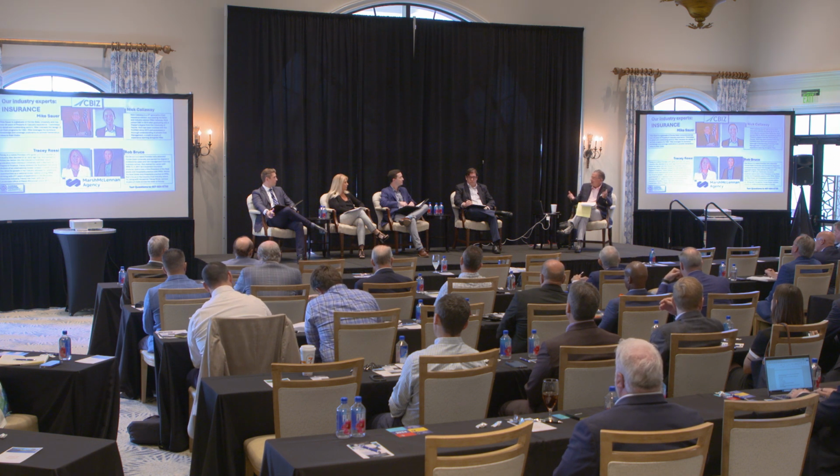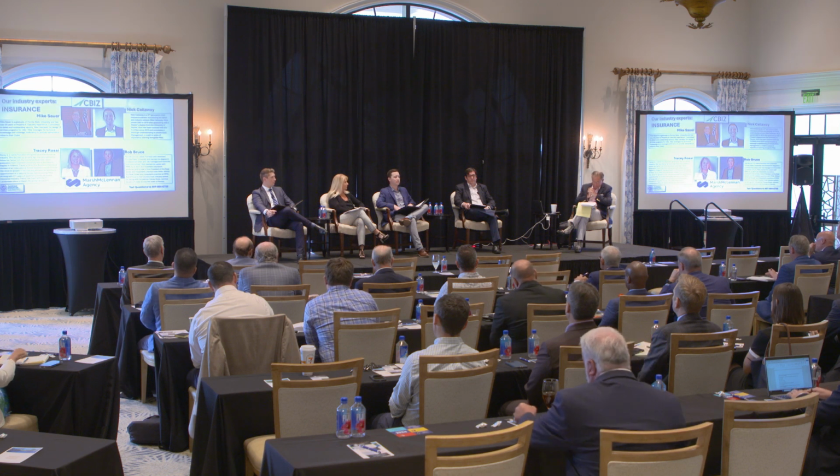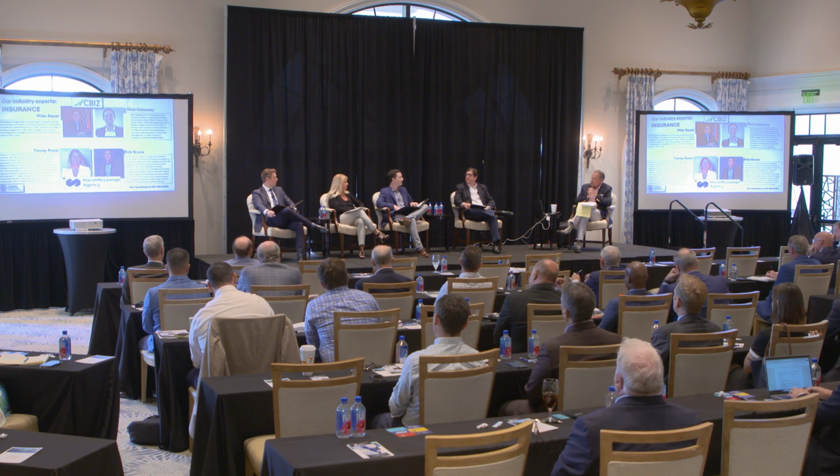And are you able to help figure out the ROI on that? If you put it in, it may cost you this, but you'll save it in insurance coverage. Are you able to help work with these folks? And without a doubt, yes. Now you can't get it to a specific that 10 years from now your cost of insurance would be X versus Y, but you can look at it in the short term and figure out that if we're saving 10% annually over the course of the lifetime, it probably pays for itself.